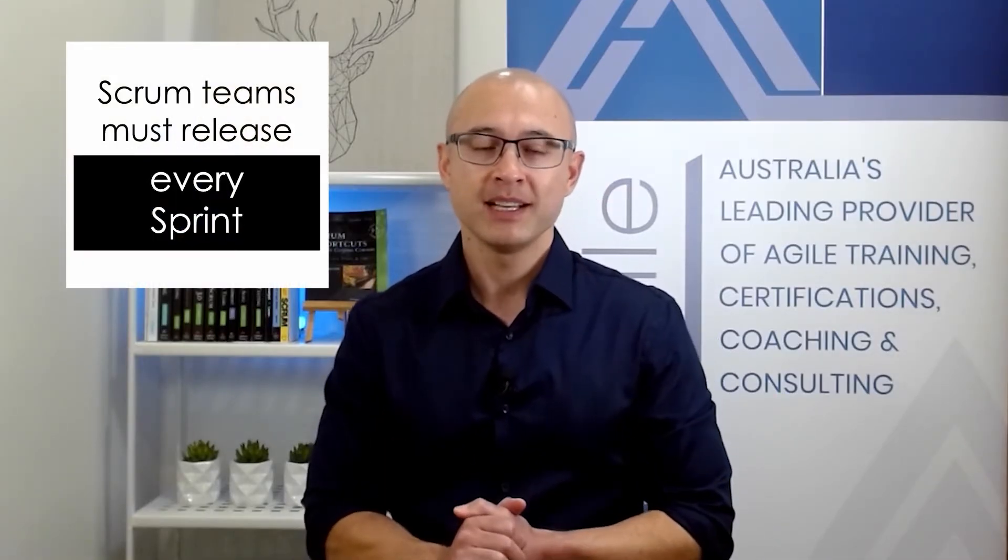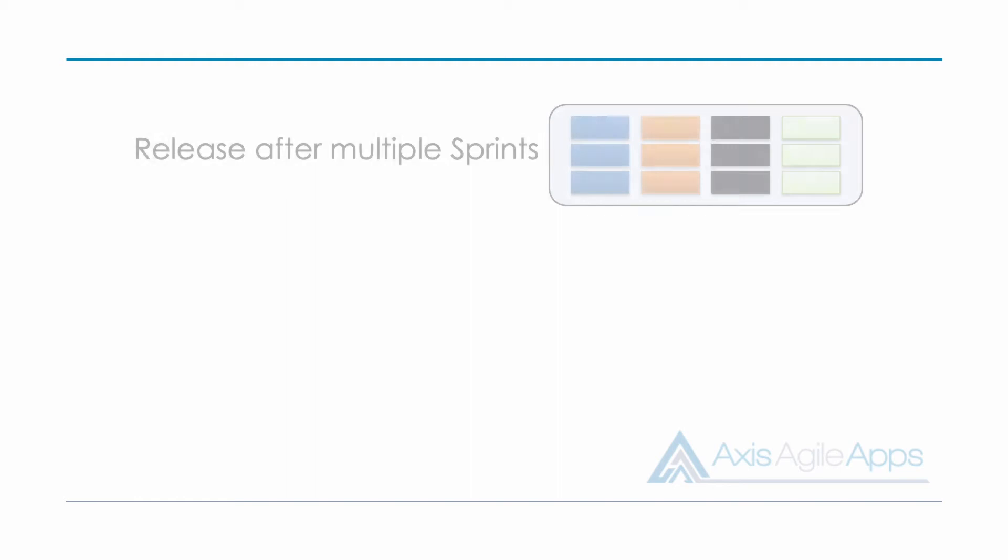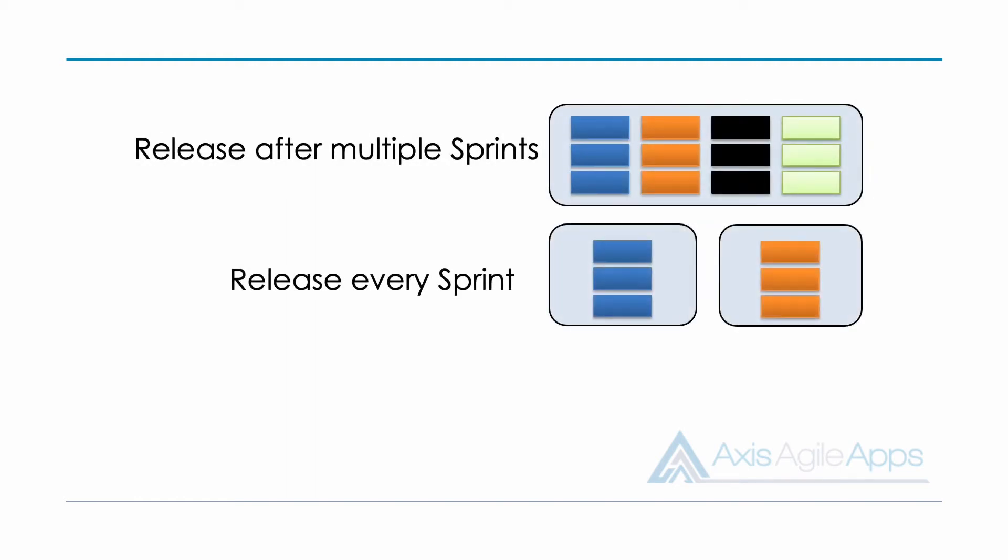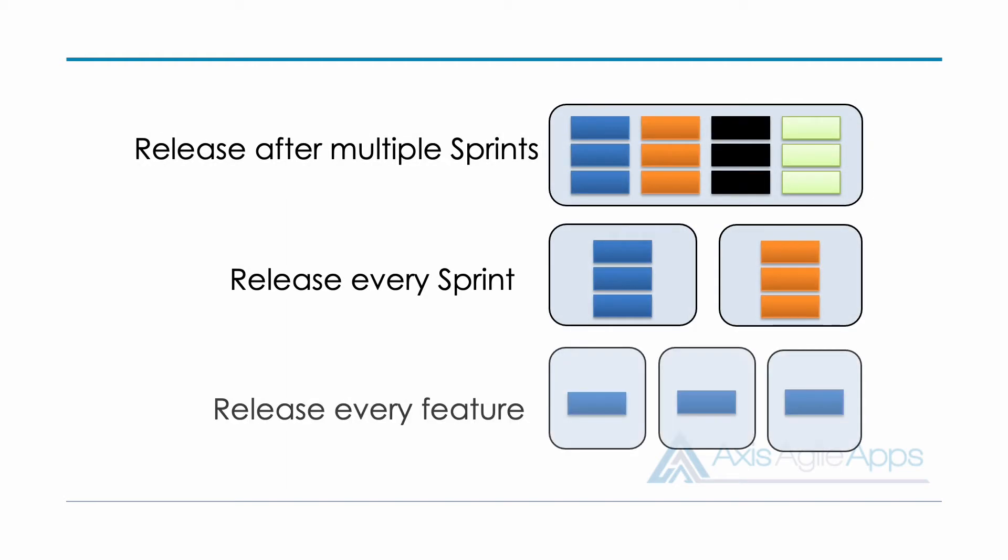In the previous video, I showed you how you can use velocity to determine a long term forecast, and we're going to use the same approach to determine our release plan. Now, before I get stuck into it, let me just squash a really common myth that's out there. And it's this myth that scrum teams need to release at the end of every single sprint cycle. Now that is not true. Scrum teams can release anytime they like. It could be after multiple sprints, it could be each and every sprint, it could even be inside the sprint multiple times. They're all fine. It really just depends on the team. Now for this video, we're just going to focus on the most common scenario, which is to release after multiple sprints.